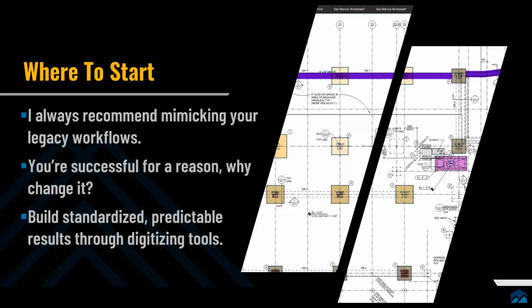Once you have all your custom markup tools created and your spreadsheet ready to go, link to a new drawing. No need to remap each cell, just the source files. Then I would recommend creating a template project folder, subfolder structure to keep all the documents standardized in location as well. Create folders for drawings, spreadsheets, RFIs, site photos, and revisions. This way, on the next project, you simply update the source file to the new drawing folder and start your markups.